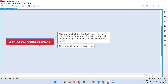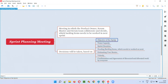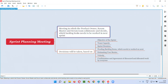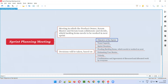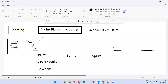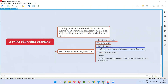A lot of decisions are taken in the sprint planning meeting, based on several factors. First is the objective of the sprint - the product owner, scrum master, and scrum team decide the purpose of the sprint and what they need to achieve by the end of it. They also estimate the capacity of the team, because work must be designed based on that capacity. Then sprint duration is considered - most projects have two weeks, that is 10 working days - and decisions are taken based on this duration.